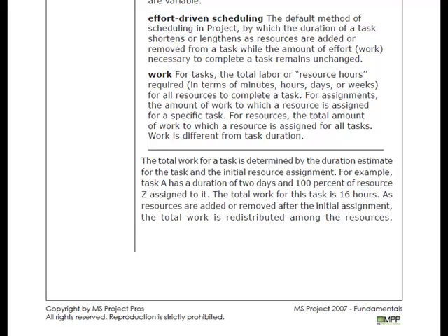As a best practice, when you are ready to do an actual assignment, what you have set up is going to be important from a task type perspective as to which of the three variables you're going to fix. One way to think of it is if you know the value of those variables. If you know the work, what the effort is for a particular task, it's considered a best practice to fix that variable.